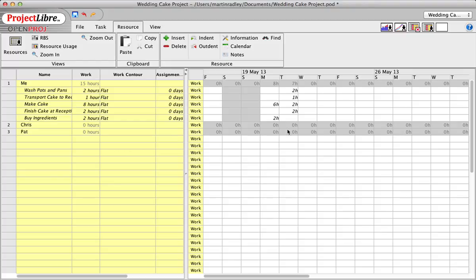And certainly from a modeling a schedule standpoint, you don't want to model overtime, right? You don't want to say, hey, yeah, we can get this in 3 months, and then when people look at your schedule, you say, yeah, you can do it in 3 months if everyone works 12-hour days every day for 3 months. That's just not realistic. So that's really what we're looking for, is we're looking to model our project's schedule in a tool like this one, so we can get a feel for how long will it really take, given the resources we have, to get this schedule done. So the 6th check that I'm recommending is make sure your resources are not over allocated.